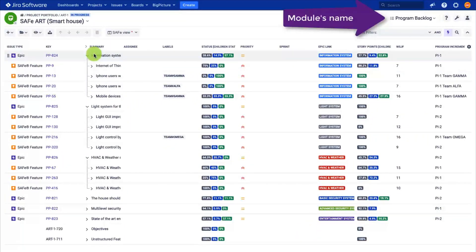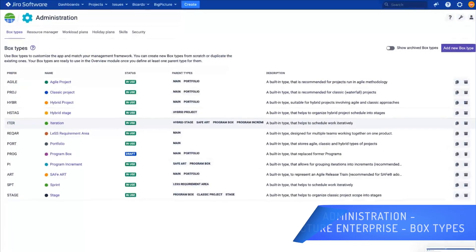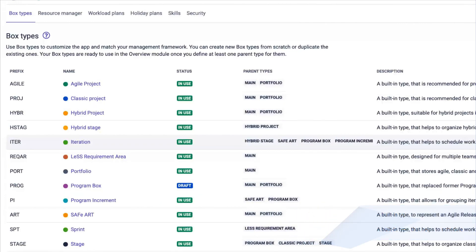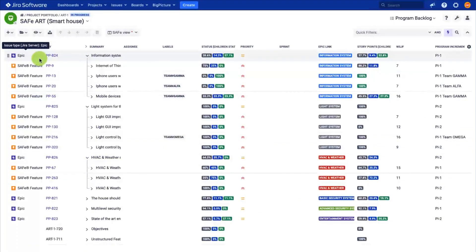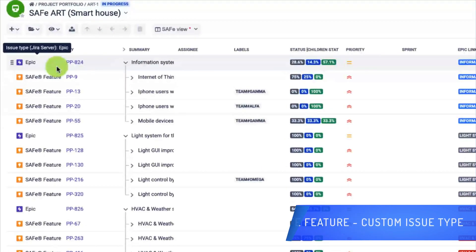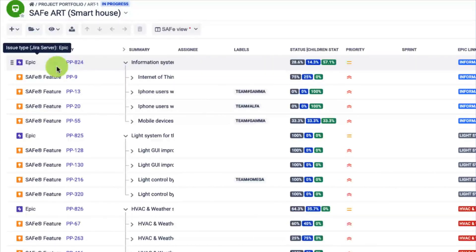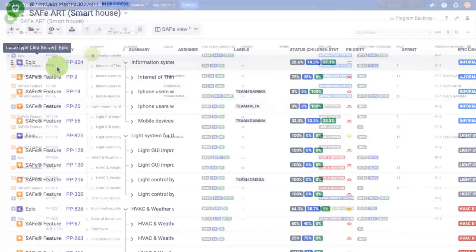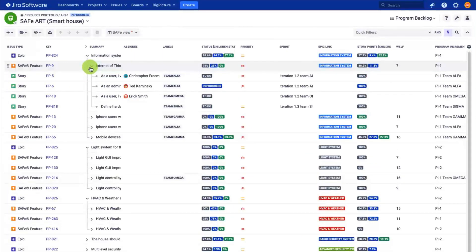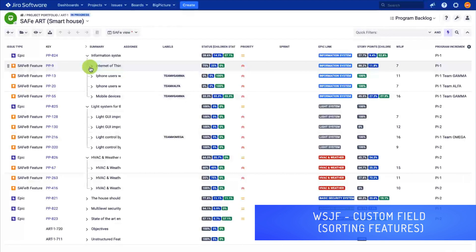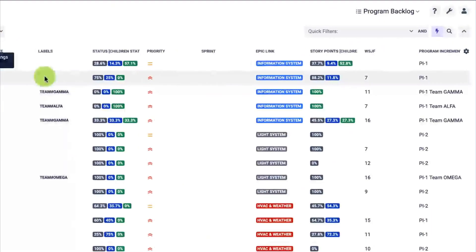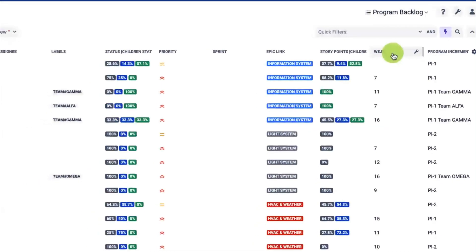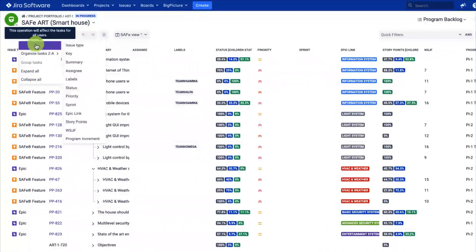By the way, I am using Big Picture Enterprise, which includes pre-configured templates so that you can start working in no time. As you can see, I have added a SAFE feature issue type in my JIRA and grouped them into work packages using the epic link. The hierarchy is done automatically by the app. I also created a custom field WSJF for weighted shortest job first, and based on that calculated value.